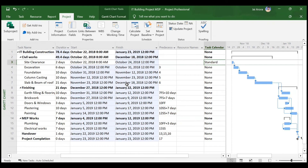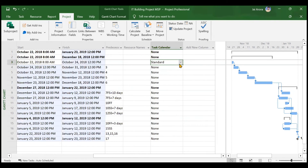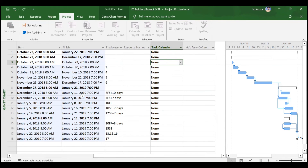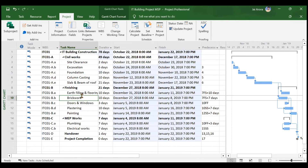The activity end time becomes 12 p.m., which is the start time for the next activity. If you want to revert, you can change the task calendar back to None. This is how you can assign a task-level calendar to a certain activity.